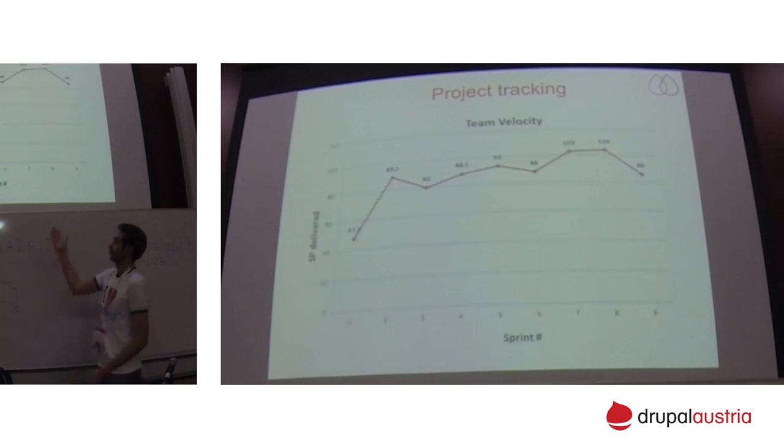Right. Okay, so obviously you can convert the previous table into a team velocity chart and see how you're going. Based on this chart you can figure out a trend and try to find out what went wrong. Like here you have a significant drop in the story points delivered, so maybe something very bad happened. And again, you should step in.